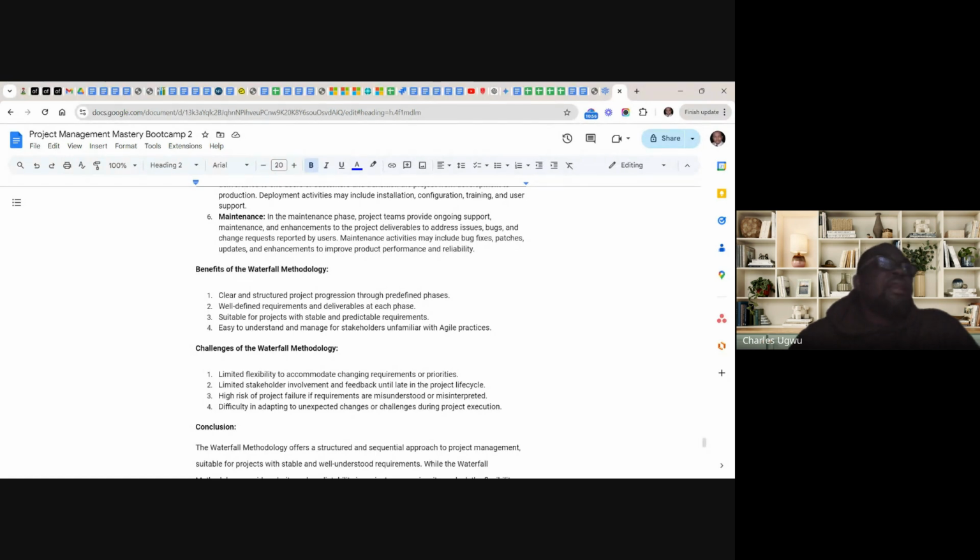So the point here is that you always have to wait. That's what we call dependency. You have to respect that a lot. We have to start practicing that no matter how much you want to hurry. That's why project management is very challenging. If they really want to get results, they have to be on my neck to make sure that they get the approval. They understand the solution I want. They want that approval as quickly as possible. But no matter what, they cannot proceed if I'm not giving approval.